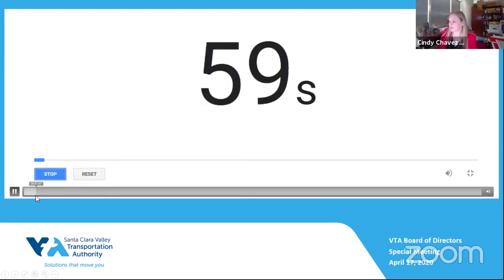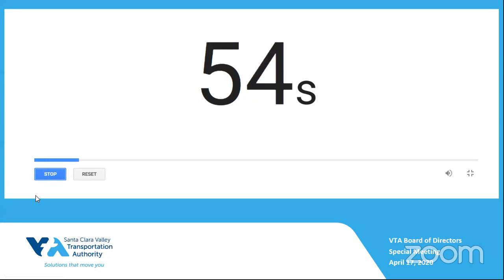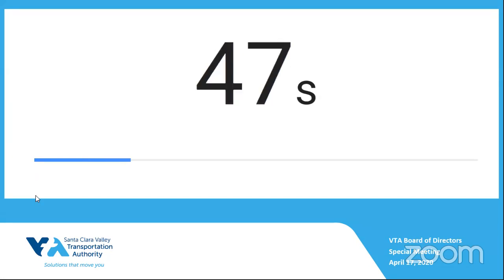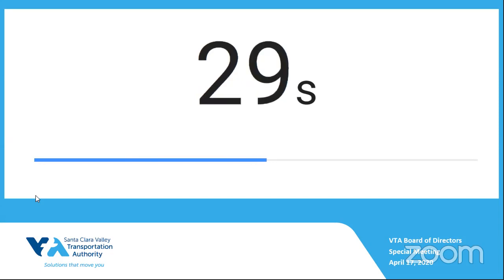As I was saying, Santa Clara Street is wide, probably wide enough that you could maintain traffic flow even while you were doing a cut and cover tunnel, and especially if you're using a method like they used in Milan. And I think it's important to consider a very shallow tunnel, especially one without a mezzanine, because station access is much better in a shallow tunnel than in a tunnel where you have to go down 5 stories to get to the trains.